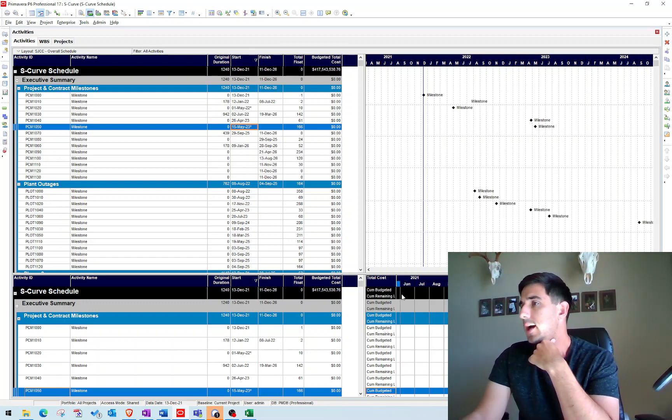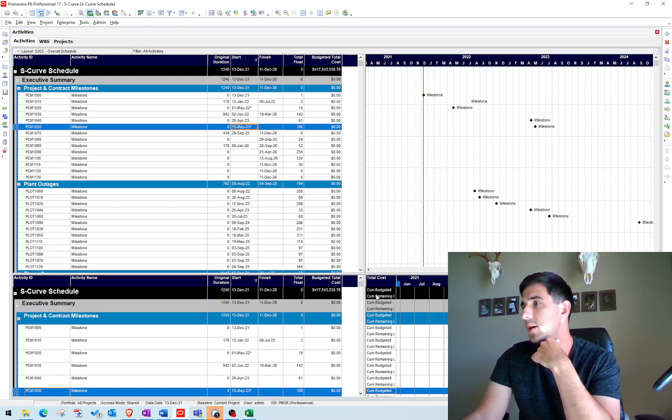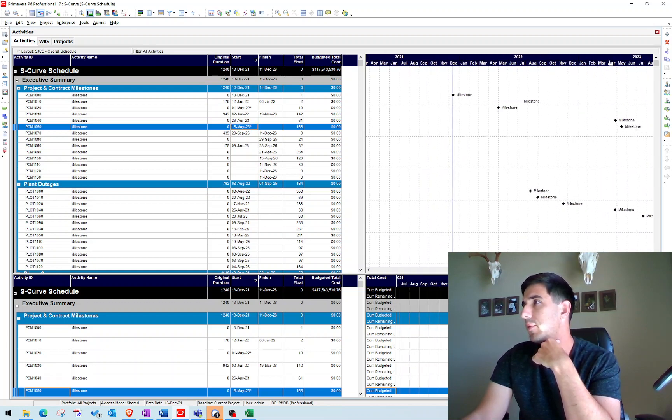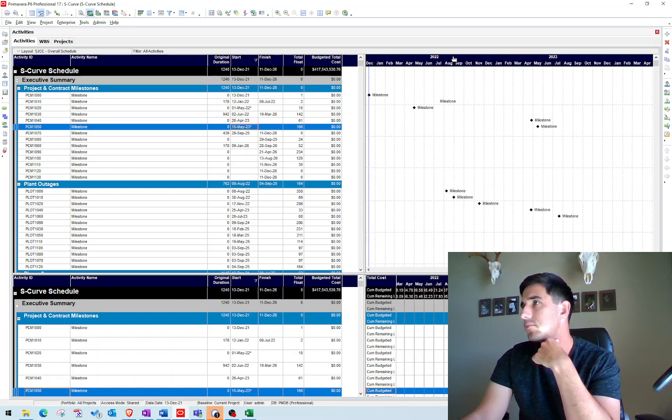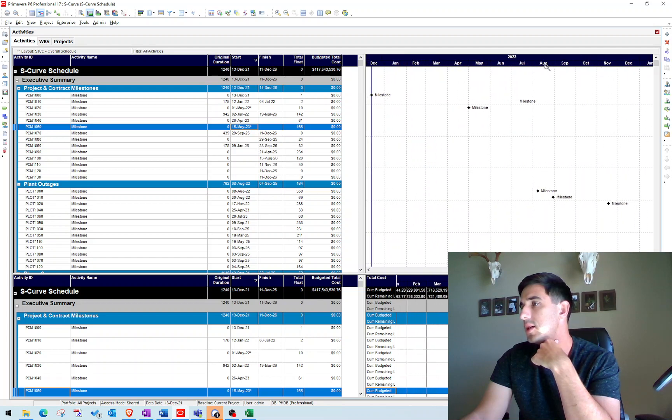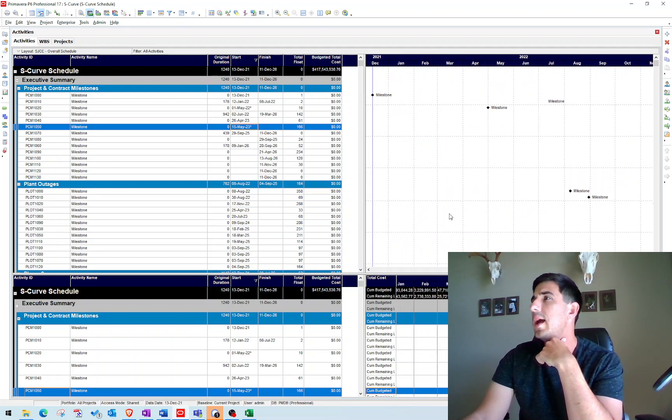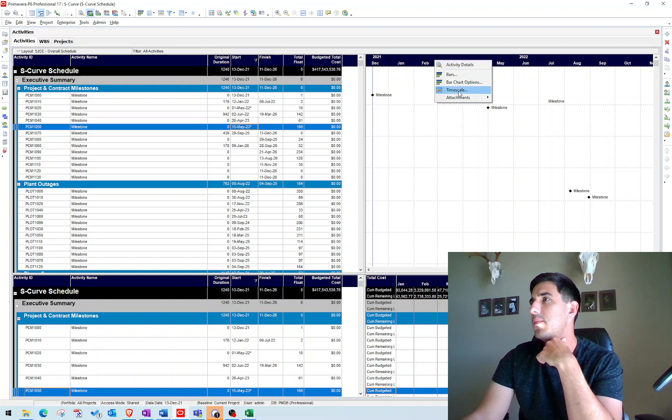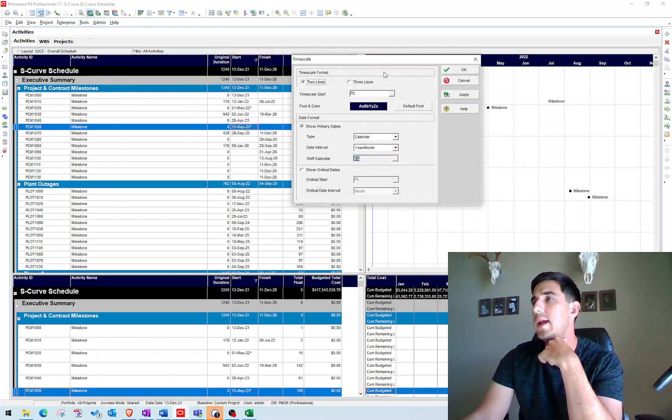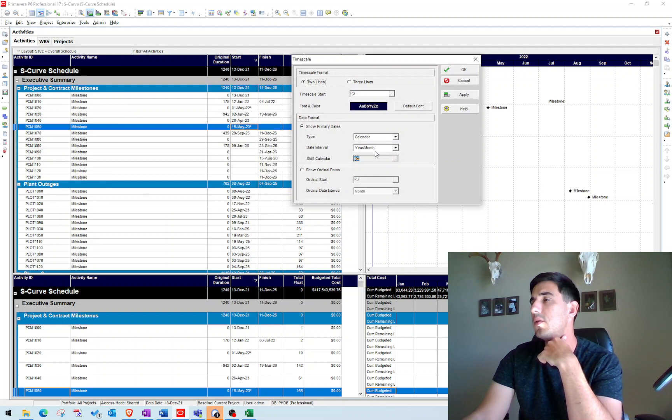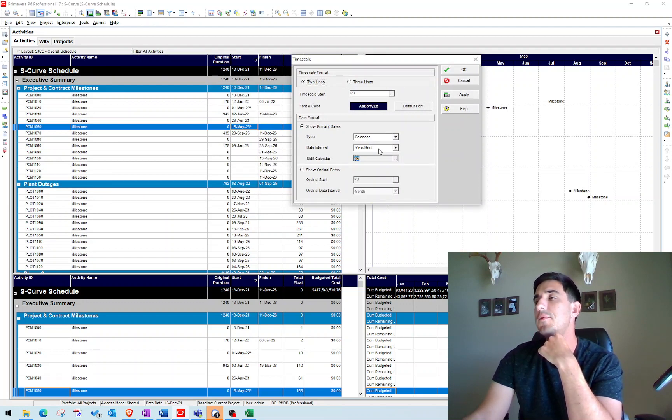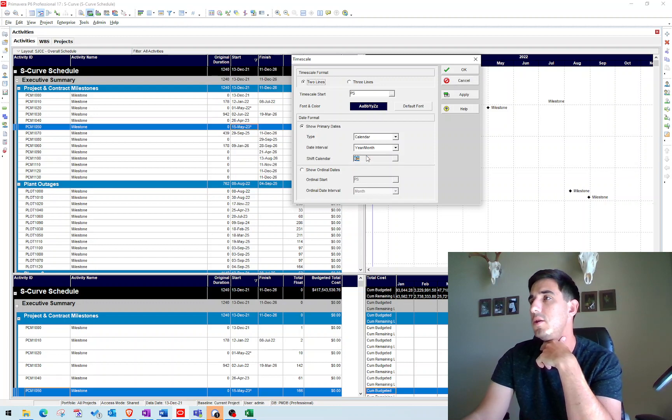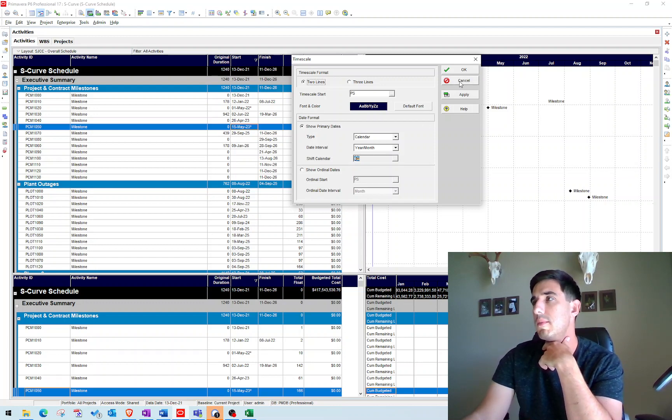So now we've added those two fields here, and you can see if I expand my timeline here, you can see those values are underneath. And make sure on your timeline, you want to be set to year and month under the date interval. Anything different than that is just going to generate a different cost curve. So I use year and month since we're doing monthly schedule updates.